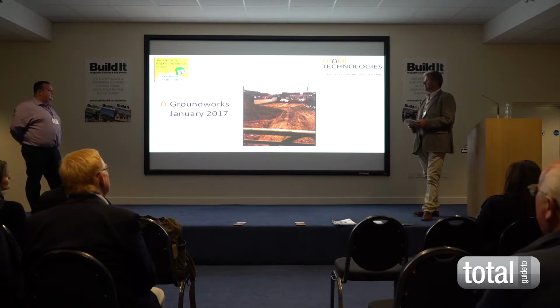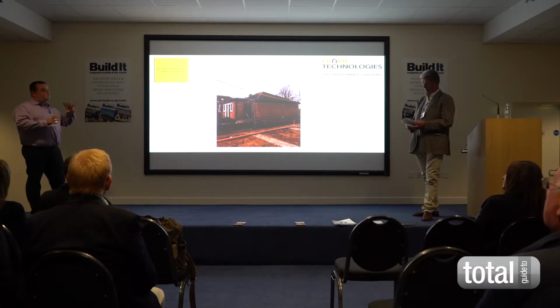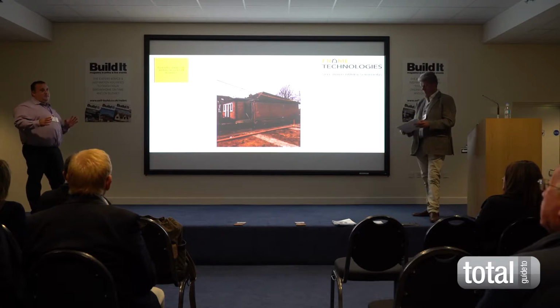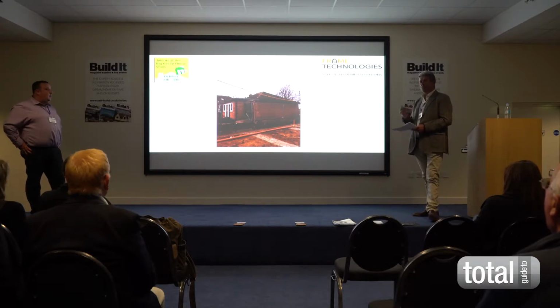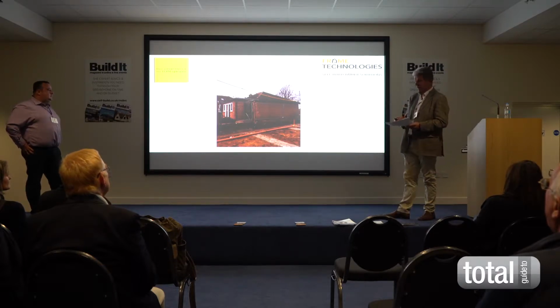But again, it was a massive learning curve, wasn't it? Yeah. We left time in between when people were coming in, in week chunks really. So if anything did move or get delayed, there's a bit of wiggle room. You can bring people forward, you can move people back, so as not to mess people around. But be realistic with that program. That's the one piece of advice I would give: don't push it all together so tight, because that's where you create your own stress.